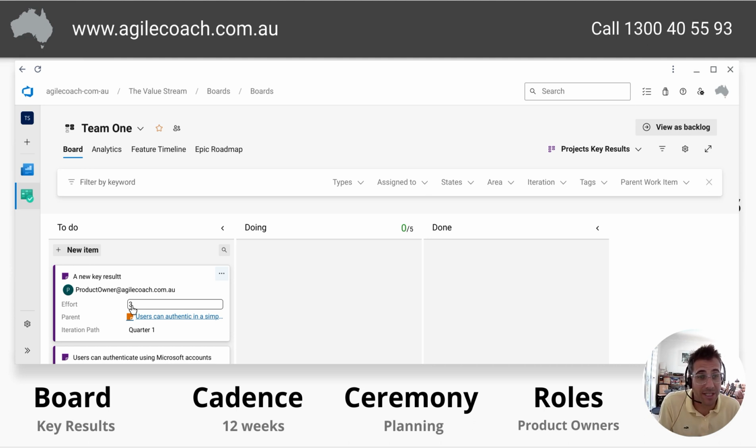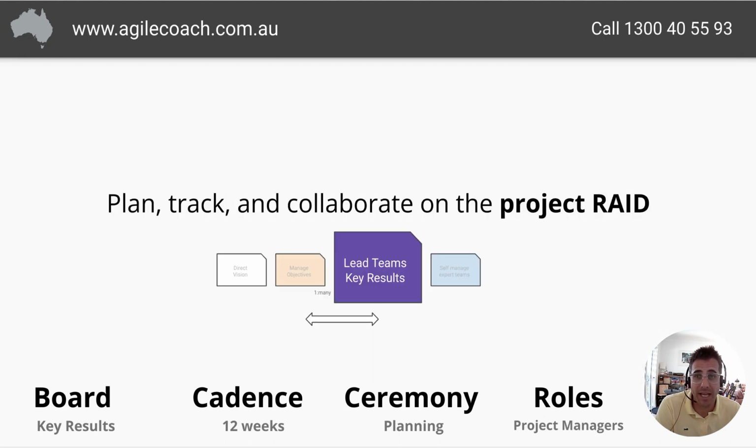I want to call them story points because everyone's used to that, but story points per quarter, because we know that's what we finished last quarter. So now you know you can go and refine another one until you get to 15, and then you stop putting things in the quarter. And that's the refinement at this level. And at that point, the team can have a lot of autonomy to take that away. So that's the planning. You've got that done. Okay, move on to the next item.